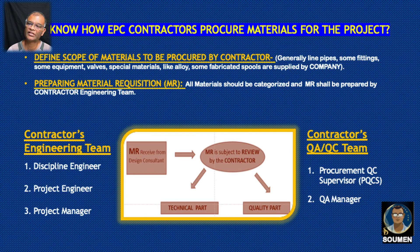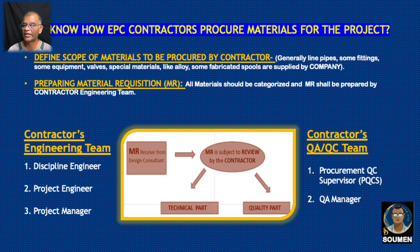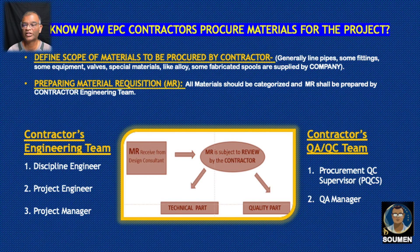Let's go into a little more detail on the sub-processes. The first step is to define the scope of materials to be procured by the contractor. Generally, line pipes, some fittings, equipment, valves, special materials like alloys, and some fabricated spools are supplied by the company. Then preparing the Material Requisition (MR): all materials are to be categorized, and the MR shall be prepared by the contractor engineering team. Flanges, for example, will all be ordered generally in one MR.